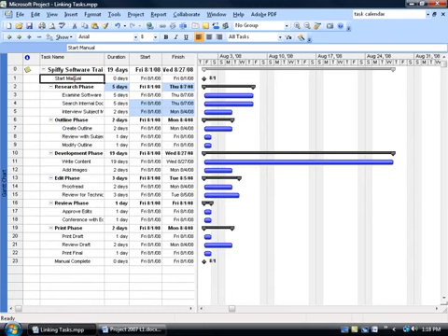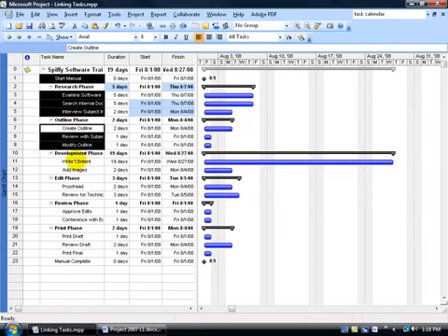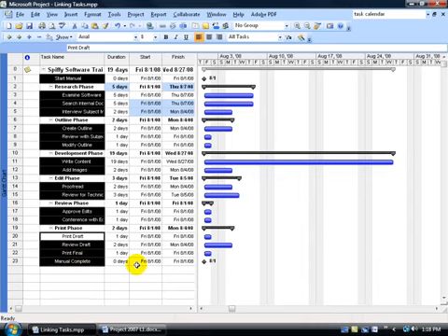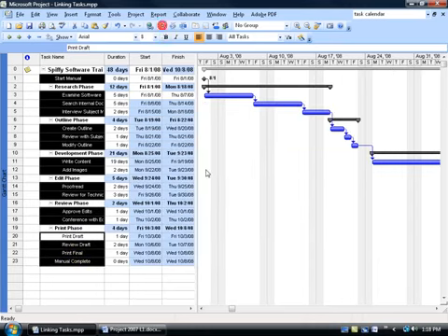So let's do this. I'm going to select the start manual, and then I'm going to go ahead and click and drag in order all the subtasks down below, making sure that I don't miss a beat here and everything's in order, and then all the way down to complete. Go ahead and click on the link button. There we go. Obviously the milestone here that you can see in the Gantt chart starts on August 1st. It's an indicator to let me know that the first task down below, as it points to, is also starting August the 1st.